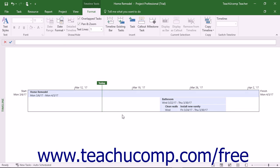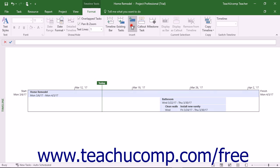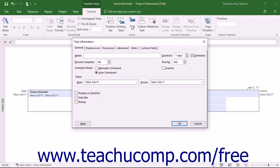You can also insert tasks in the timeline view and have them appear within the Gantt chart view as well. However, note that tasks created in the Gantt chart view are not automatically added to the timeline. You can click either the Task, Callout Task, or Milestone buttons in the Insert button group on the Format tab of the Timeline tool's contextual tab in the ribbon to open the Task Information dialog box. Here, you can enter the task details and click the OK button when finished to add that task to the timeline and to the project file.